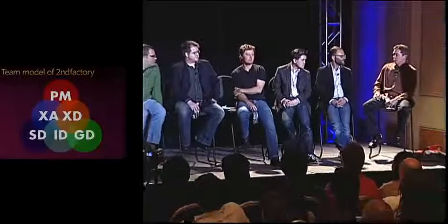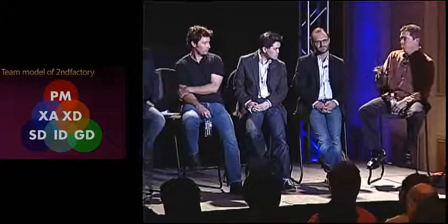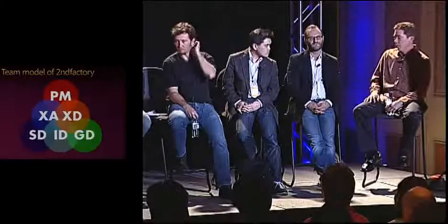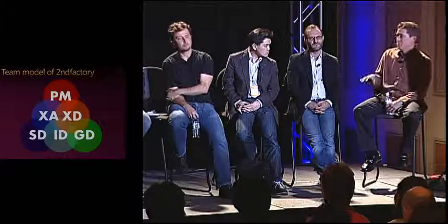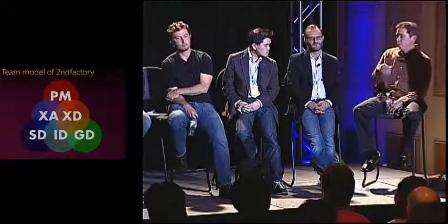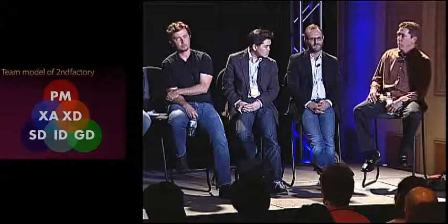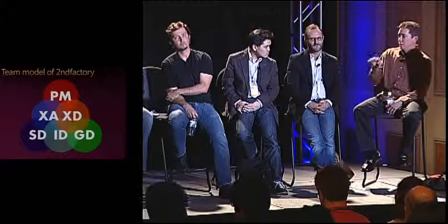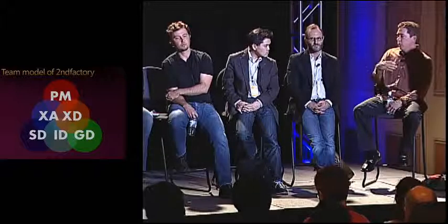And something we've been trying out on the last couple of projects is having, at the end of what we call our discovery phase, where we've got some wireframes, some early visuals, maybe some interaction comps, a deconstruction meeting where the designers, tech, even program managers, the entire group go through a 1, 2, 3 day technical summit to deconstruct, break down the design. And really, it's more technology-led.